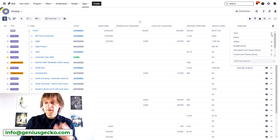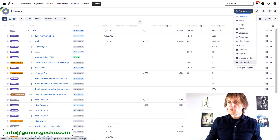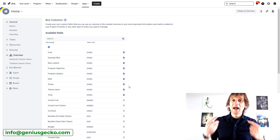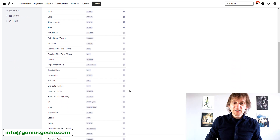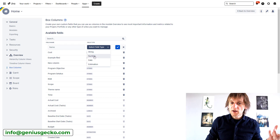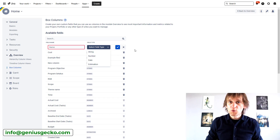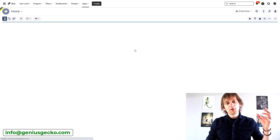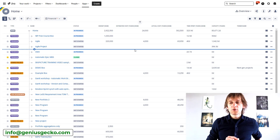So if I was able to add a custom field, you can do it too. Go to Configuration, then inside Configuration go to Overview Module and Box Columns — that's exactly where you find the functionality to manage these fields. You'll see the list of existing fields and a plus icon to add a new one. You can add a string, a number, a date field, or an estimation field. Just provide the name, choose the type, hit the yes button, and the field is created and becomes selectable in the Overview module.